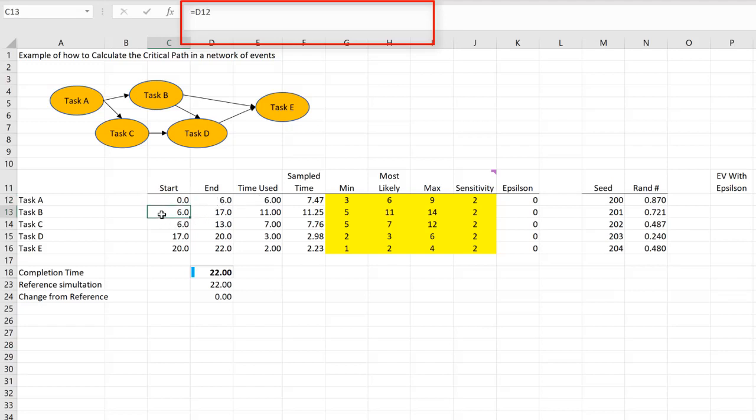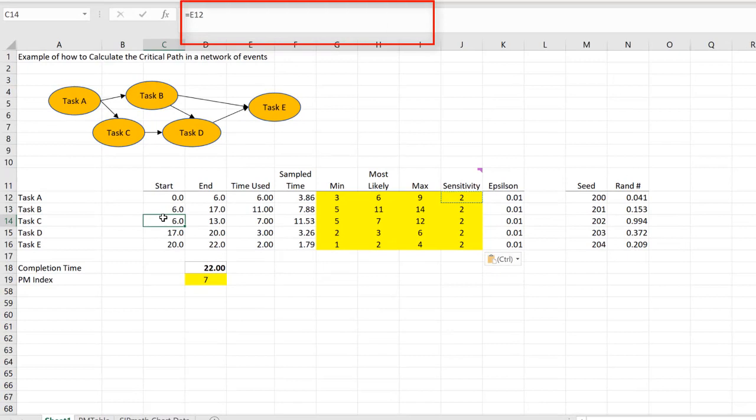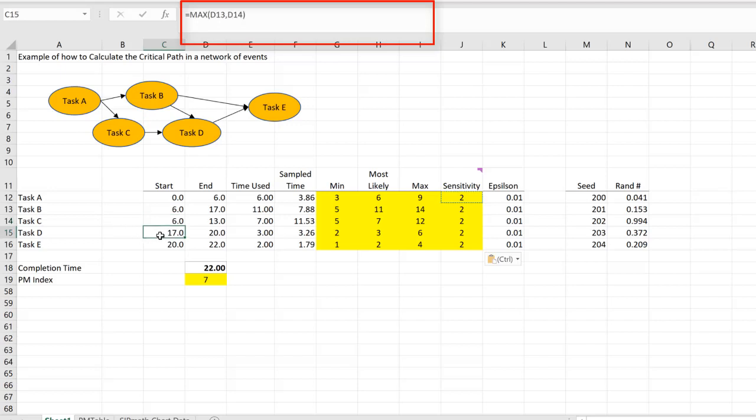Task B starts at the end of task A and requires 11, so it finishes at 17. Task C starts at the completion of task A. Task D starts at the maximum of task B and C.